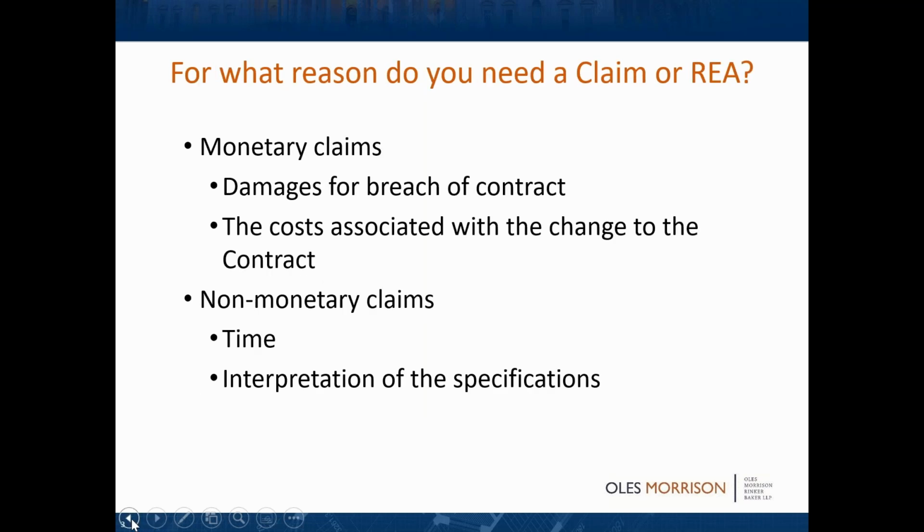So, Howard, you might ask, why are we even talking about a claim or an REA? What do you need this for if you're performing a contract? Well, you're going to need it for what we call monetary claims. That's damages that you've incurred, increased costs because the government has breached the contract, or costs associated with a change to